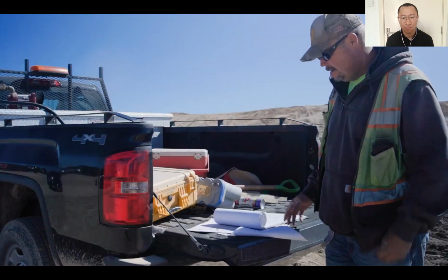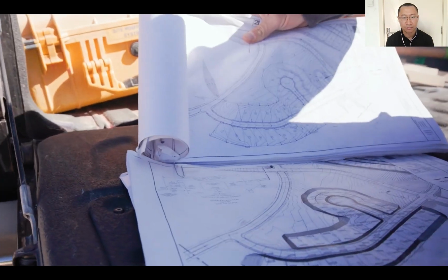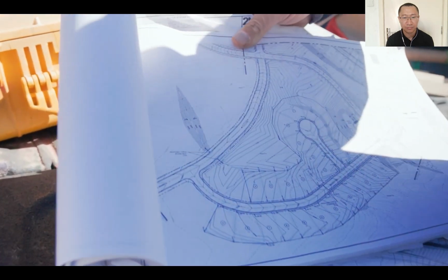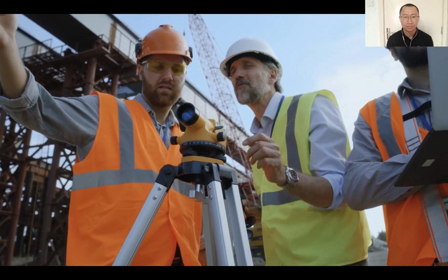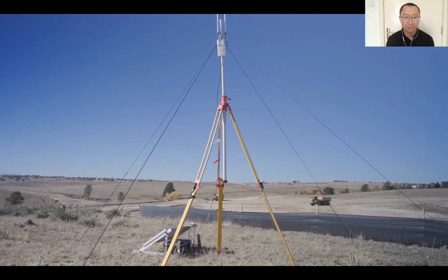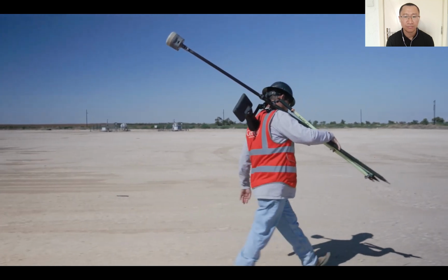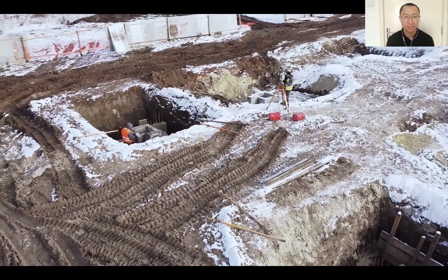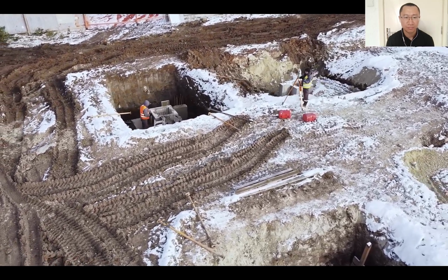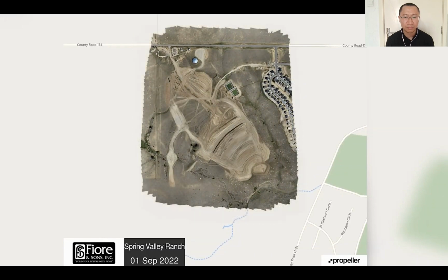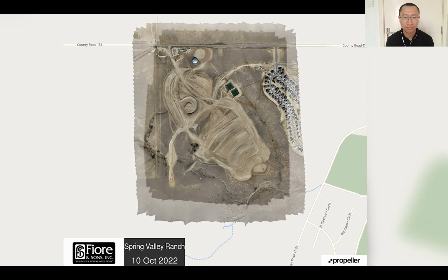Once we're done, we'll be able to have a final topographical map of the area, hopefully delivering within plus or minus 2/10 spec to our client. The traditional way of surveying is you set up a base and rover or a total station. You walk the site or set it up on an ATV or a truck and literally go along and put the rod on the ground and take a shot every 15 to 20 feet. Now we use a drone. We get such density. We're getting a point about every 2 centimeters horizontally, and vertical is way more accurate. The density is unreal.